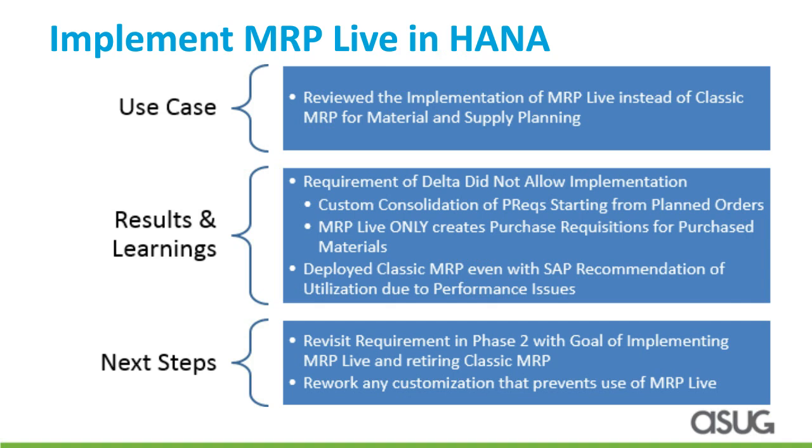Maybe one overall note that I didn't highlight earlier, everything around the supply chain and operations space, we made some decisions as an organization to keep interfaces in place to existing systems, which are driving some of the things that Sean will talk about, to reduce organizational change management risk. So that was a known and intentional decision by Delta Faucet to manage risk for the first phase of the project. Correct. Yeah, so as an example of that, just for the audience, the warehouse management system stayed in place. That was chosen, with an interface to that, just to minimize that change management for that group. Right. I think we have a slide on that too, so I'll address that one right there.